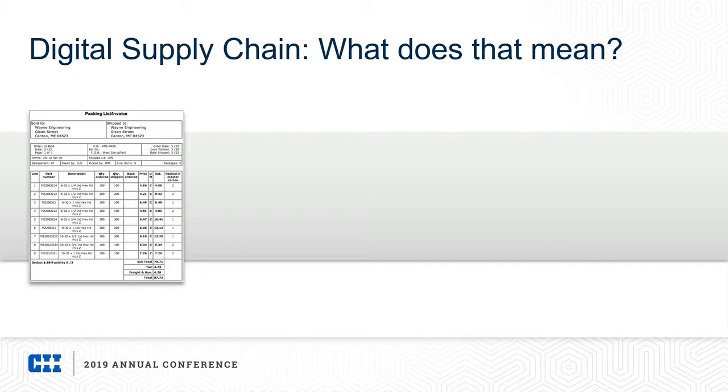So really this information is provided by suppliers in this document-centric world, but unfortunately a lot of that information does not make it back into the proper systems prior to it arriving onto the job site. If you look at how we utilize the documentation from suppliers, a truck shows up to the job site, brings this packing list that you see here on the left of the screen that has the items that have shipped, the quantities. They offload the goods, and then the checkers in the warehouse or laydown yard begin marking on that documentation and identifying items that have arrived, noting down any discrepancies, and maybe even adding in some ship loose components that need to be tied back, as Jeff was saying, to the work plan or to a parent tag or something along that.